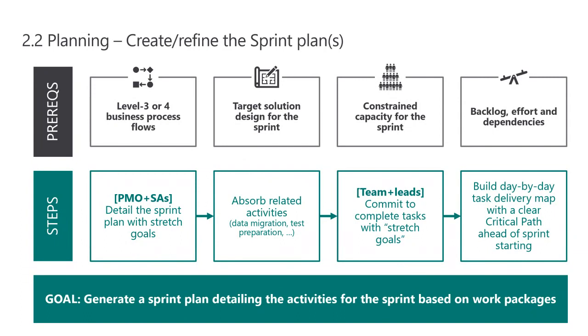You still need to have a plan that defines the sprints, how I'm going to get my sprint delivered. So in your macro plan, let's say you've come to the conclusion that you can deliver the solution as a complete solution, ready to be tested in user acceptance testing in, let's say, 5 sprints, 6 sprints. But for each of those sprints, you need to have a detailed plan as to what you're going to deliver in each sprint and how you're going to deliver that. So before you start your sprints, make sure that you've got the following.